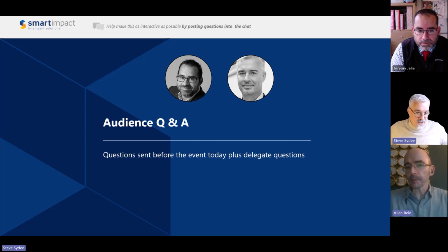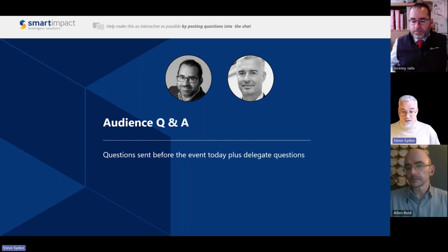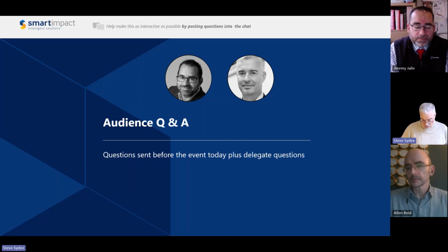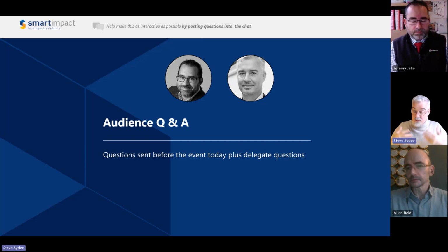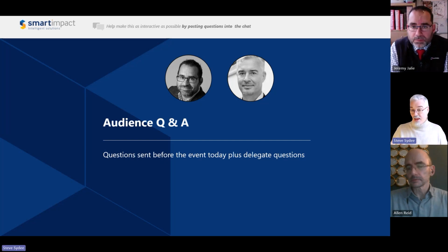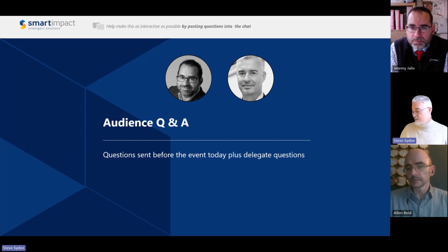And Steve, if I can just add to that as well, Alan. The Bar Council was a good example because they actually wanted a website and a CRM system at the same time. At the time they had a website supplier they wanted to work with separately as well. But they actually asked us to prime the whole thing. So some suppliers, if you don't supply all of the constituent parts, you can still prime it. So there's one lead supplier, and that worked very well for them.